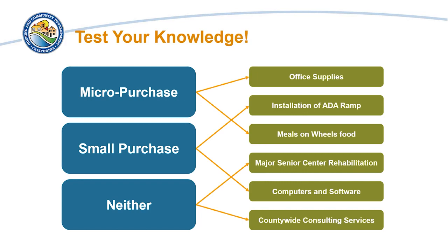The selection of a construction contractor to rehabilitate a senior center where the contract amount exceeds $250,000 must be procured using the sealed bid method. Likewise, a countywide consultant contract expected to cost more than $250,000 — even if the CDBG-CV share is less than $250,000 — must be procured using the competitive proposals method, most often through a request for proposals.